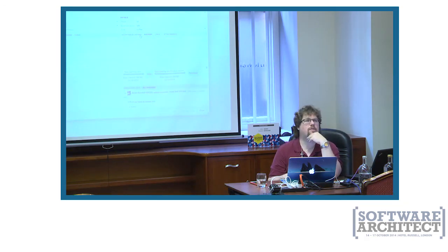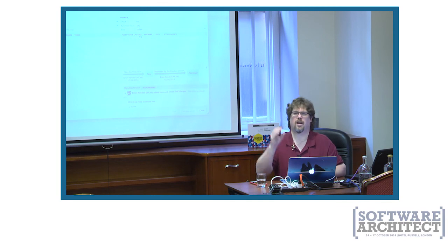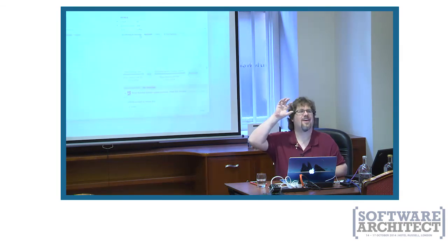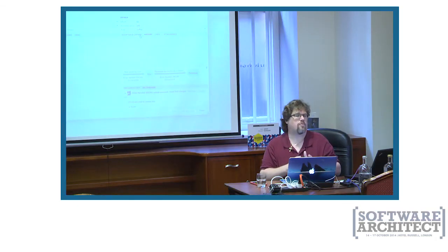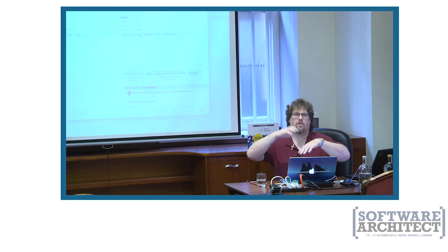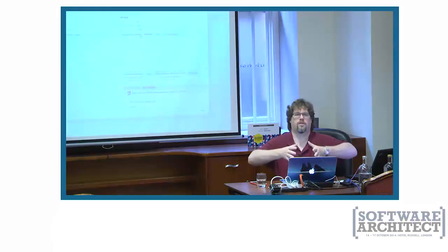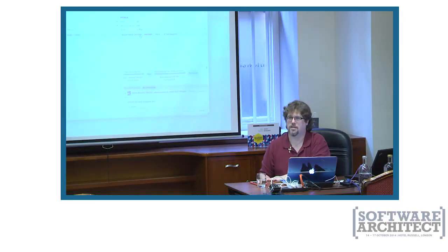For areas, you can think about, if you're building a product like Office, you might have top-level areas that are Excel, Word, PowerPoint. And within them, you might have sub-channels. You can go up to, I think it's 14 levels deep on those trees. Those are really helpful when you use things like Excel, or if you're on premises, the reporting tools, to slice and dice things. Because you can do cross-cutting across different types of work items to see all the work that went into a particular part of your product.